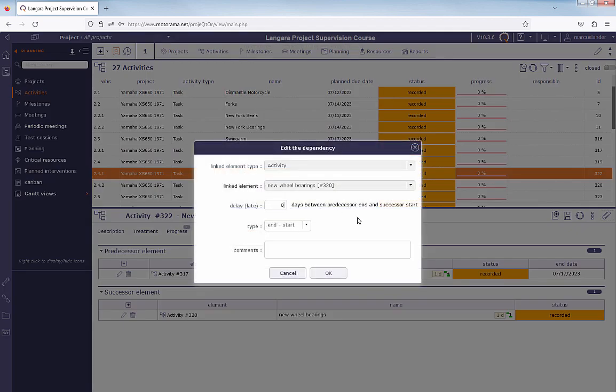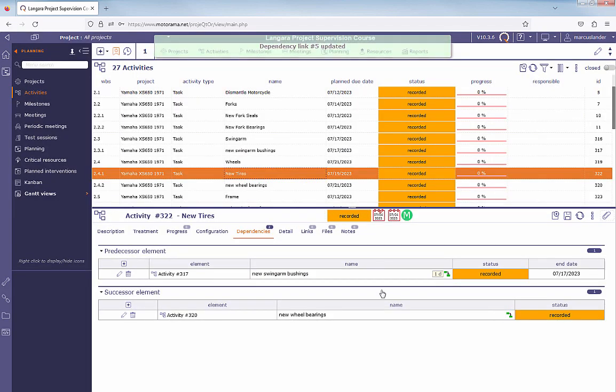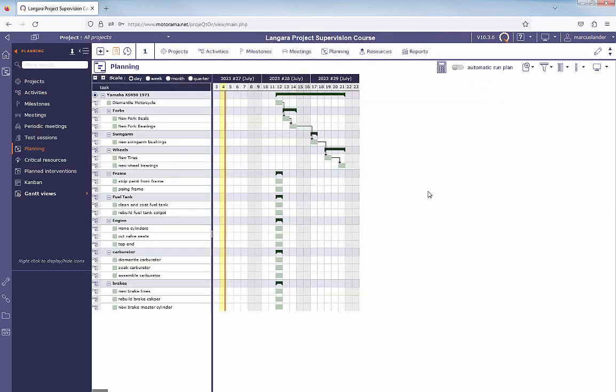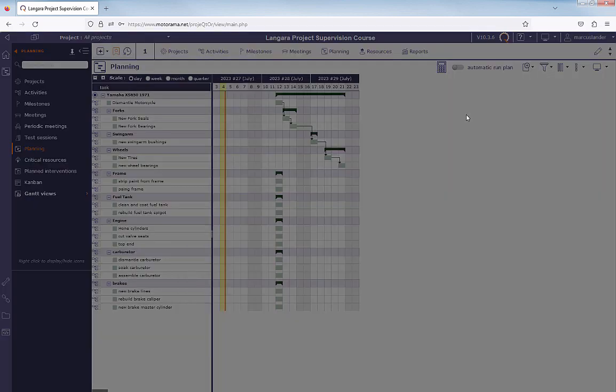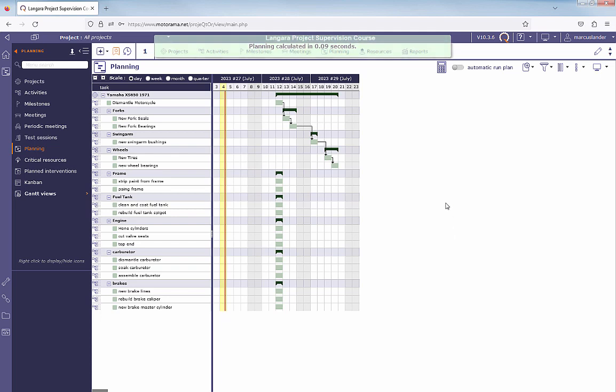Let's just set that to 0 and see what happens. And we'll take a look at planning. And calculate. There we go. So now we only have a day delay, not a day on the other side. So that's basically linking tasks as well as using this little calculator, which is called Calculate Capacity Planning. And then once we link all of our tasks, then we'll be taking care of the first part of what we want to know about this project, which is how long it'll take.